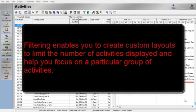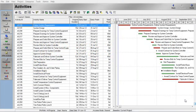Filtering enables you to create custom layouts that limit the number of activities displayed and help you focus on a particular group of activities — for example, all critical activities within a project. In the first part of this example, we are going to filter only those activities that are critical.